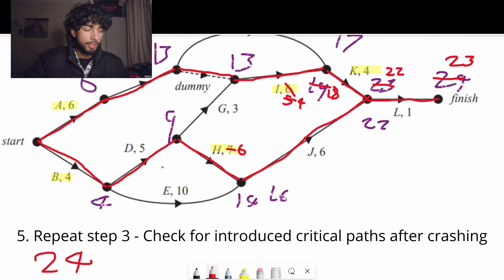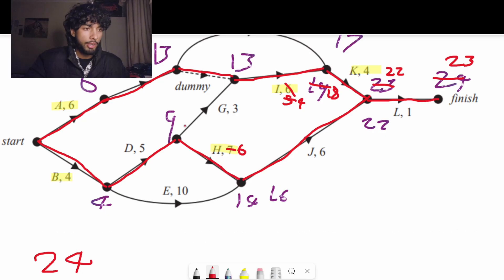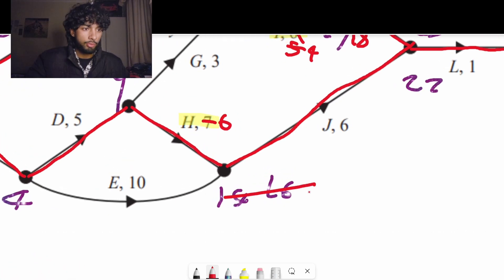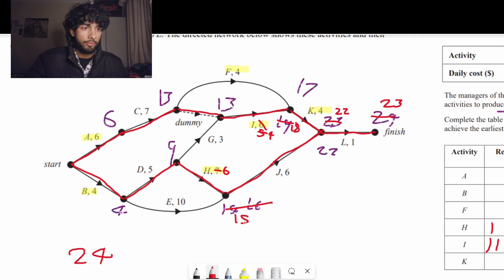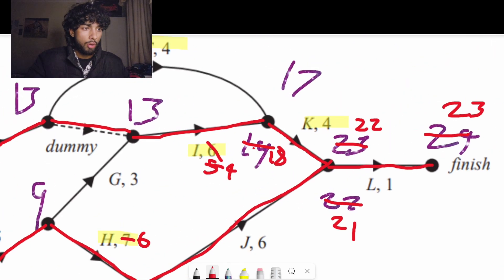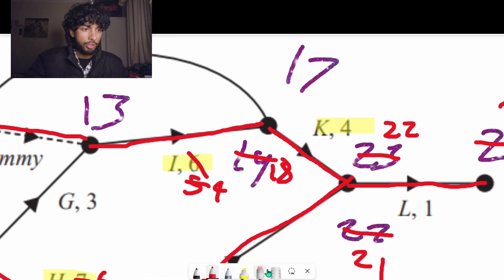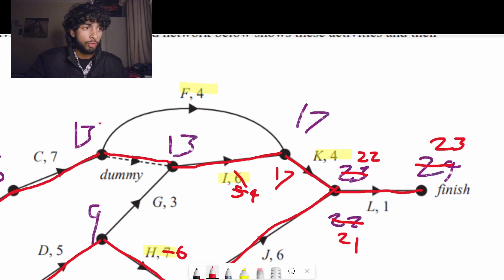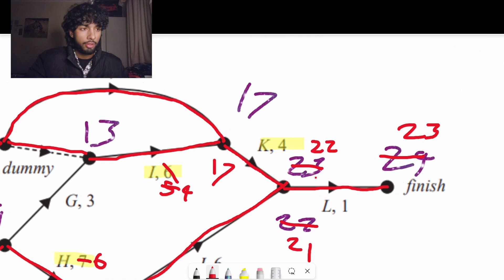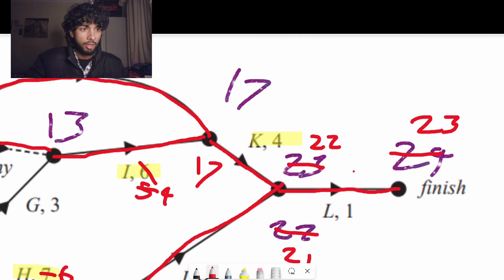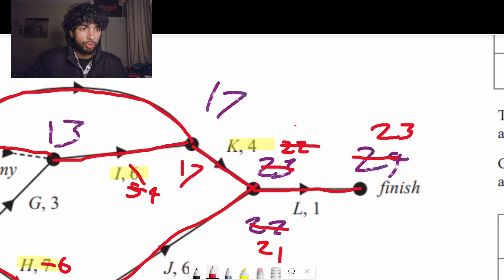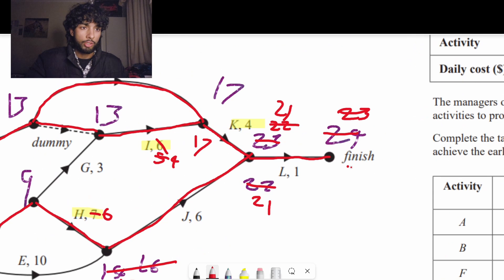So I'll put in my tally marks h and i. Let's reduce these things by one day. So how does this affect the overall completion time? 15 plus six, 21. And at the top, 13 plus four is now 17. What we also notice is that there's a 17 at the top here, which means that this path is now introduced as a critical path. And now the overall completion time is 22.